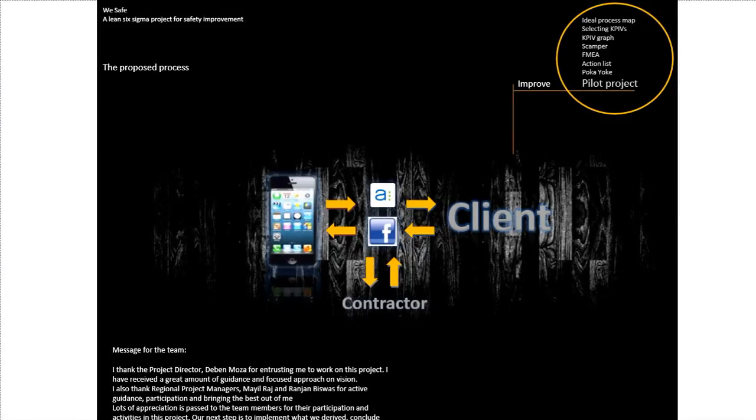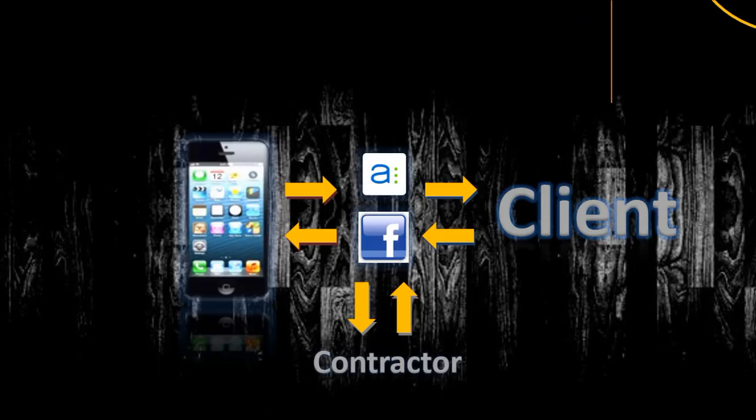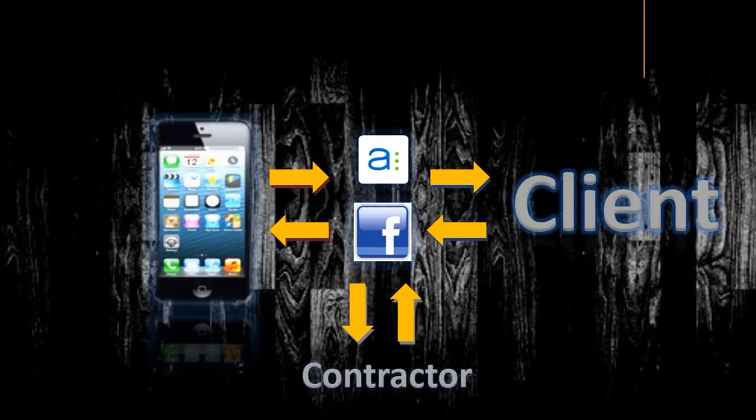We are going to use iPhones or connected cameras with a Facebook-like but formal platform where we have direct interaction with our client, contractors, and PM team for safety. An example of such a platform is Asana. Once a violation photo is taken from the site, it is immediately uploaded with a comment onto the Asana platform and a message is sent out to all the stakeholders. Thus, a set of such photos will essentially form our report.